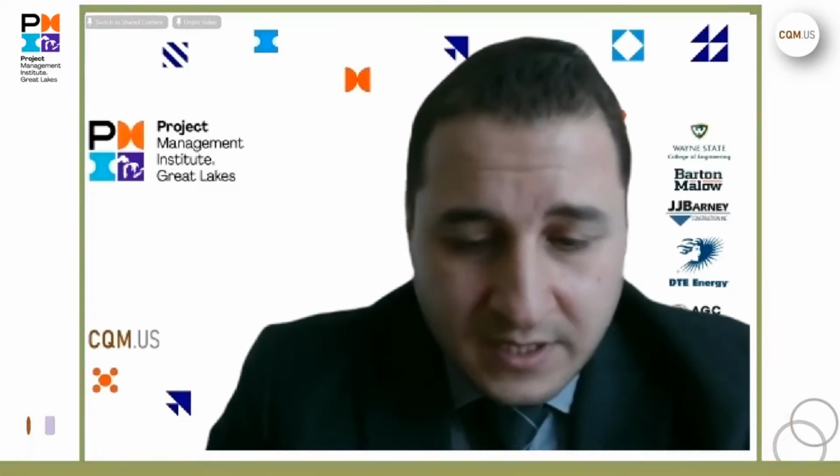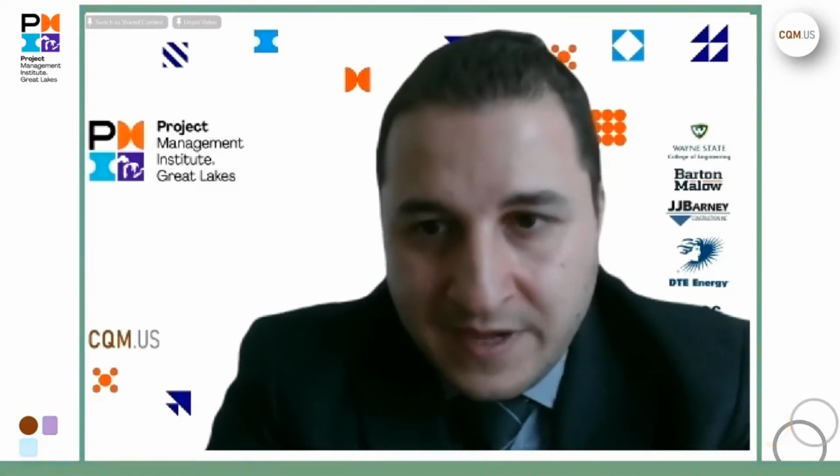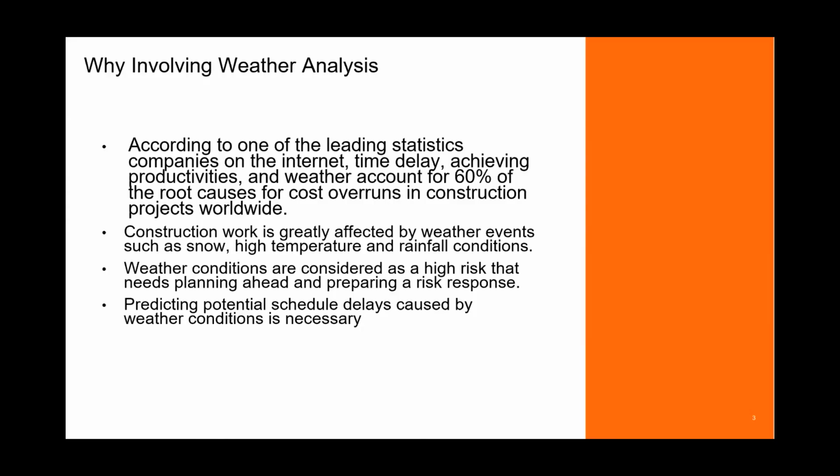Also, this will add float, and from a client's point of view, extra float is really not welcome in a schedule. Everything should be calculated correctly. Another effect is that some activities get into the critical path when they shouldn't be. When you do the update cycle during the execution of the work, it will take some time to investigate the reason for the problem. Then you realize these activities are too long, they shouldn't be that long. So this practice is not really okay. I'm just mentioning it to let you know about it.